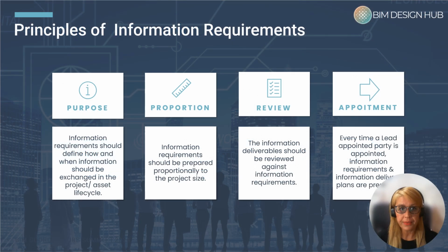ISO 9650 defines a set of principles for the information requirements. Information requirements should define how and when information should be exchanged in the project asset lifecycle. Information requirements should be prepared proportionally to the project size. The information deliverables should be reviewed against information requirements.